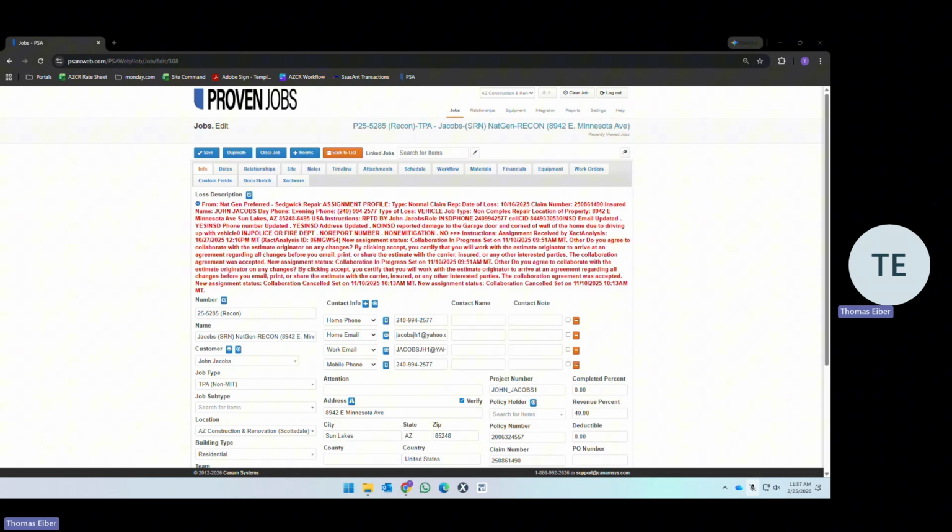So in case you find something that the client did not want but now does, or if you find additional damage or something that needs to change, you provide those requests, the information to the estimator, both in PSA and via email. For accounts receivable, you are providing them a PCN upon completion of work, though that comes in the form of an automatic system note after operations puts in a date for your PCN. But you're still providing them the information to ops to give to AR.